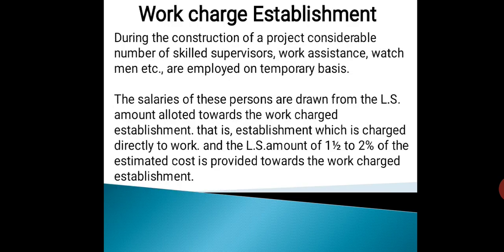Work establishment refers to workers and labor hired on a temporary basis. During construction, these workers are employed temporarily. Salaries for these persons are covered by an amount added towards work establishment. This includes costs for supervisors, assistants, and watchmen employed temporarily for the project.